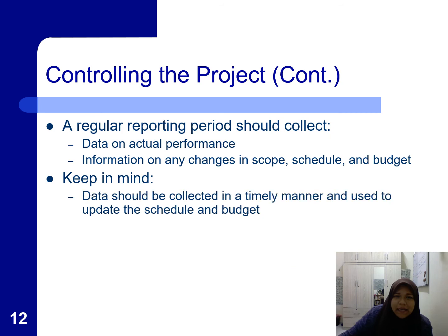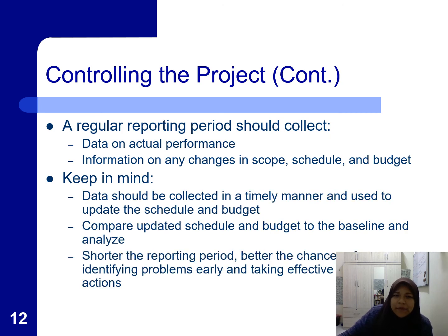Alright, so the regular reporting period should collect the data on actual performance and information on any changes. You also have to remember that data should be collected in a timely manner and it should be used to update the schedule and budget. So you should know whether you have overrun your budget or you have delayed the schedule. So it's very important for you to update.